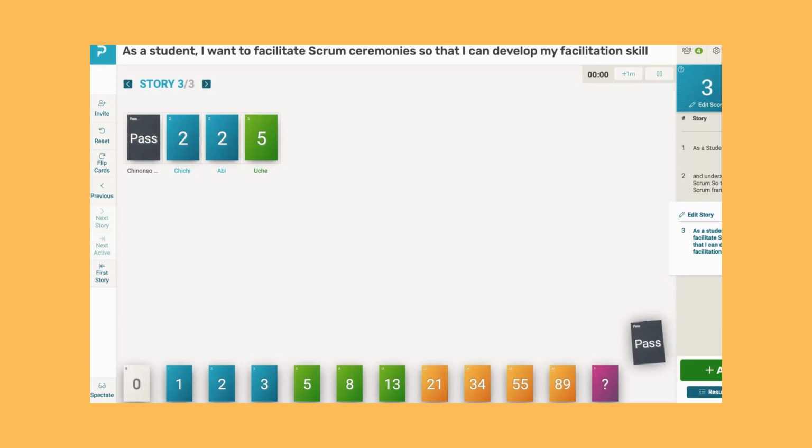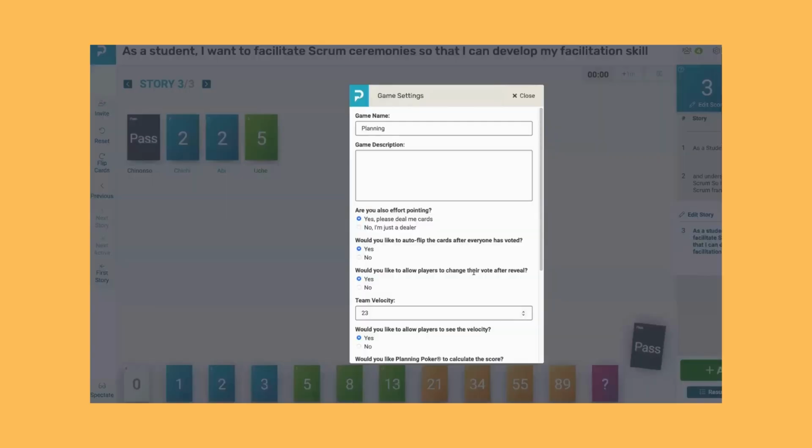Now, remember that when I was doing the setting, if you look, I added our velocity. What is team velocity? Your velocity stands as your capacity, your average velocity so far. Team average velocity is the accumulation of your velocity. Maybe you can do like 3 sprint velocity. So for the team, they've had experience, they've worked in the past, they've gotten like how much story points they were able to do every sprint.